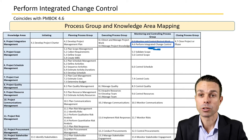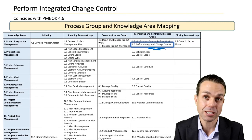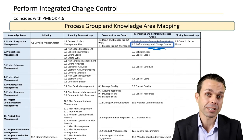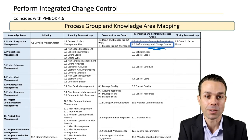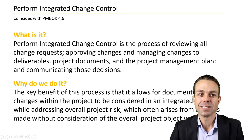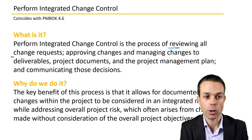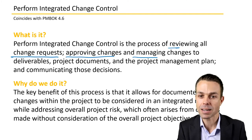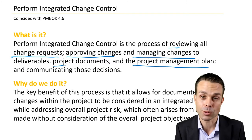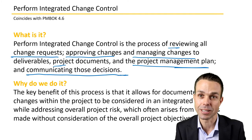So now we're monitoring the project, we're controlling the project, and we might need to make changes to baselines and documents like scope, schedule, cost, or even quality in some cases. And those changes need to go through the proper procedure and then go back into the project management plan. So what is Perform Integrated Change Control? It's the process of reviewing all change requests, approving changes, and managing changes to deliverables, project documents, and the project management plan itself — which was a baselined document — and communicating those decisions to the appropriate stakeholders.